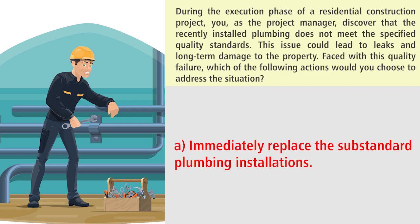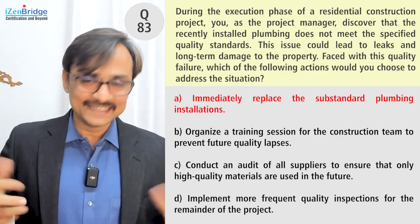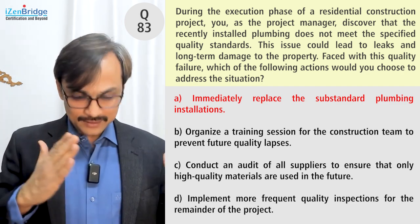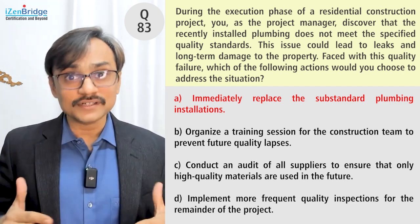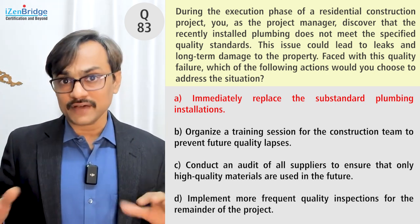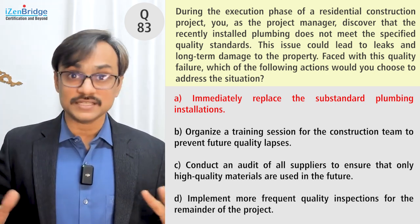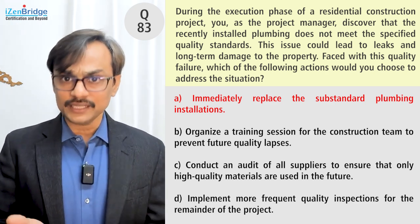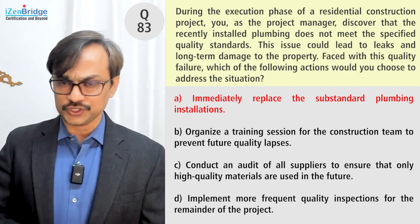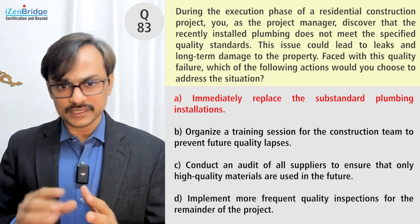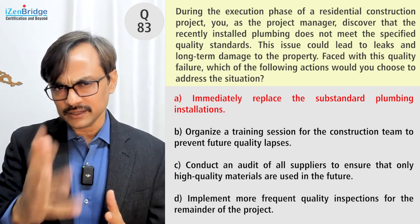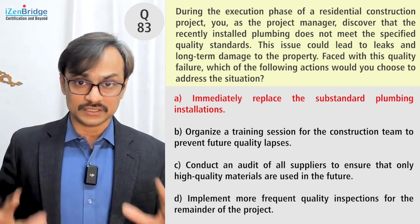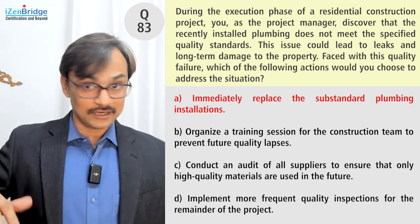Option A: immediately replace the substandard plumbing installation. This is a direct action — possibly a good choice. But I keep reminding myself: act after acknowledging and analyzing. So I need to see if there are 'acknowledge and analyze' options available; if not, this is a good idea. I need to replace this thing, take care of this issue, recognize it, assess the impact, and based on priority, act on it. That's a good idea — let's keep Option A as a candidate and move forward.